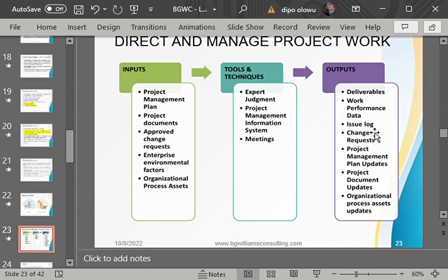Okay, so you can also see change request. You see that, like I said, every aspect can be changed. The deviation that occurs, where the project manager decides to use corrective action, is a change. Which means for any of the three actions that the project manager will decide to take, he must pass through the change request process, which is referred to as the integrated change control process.